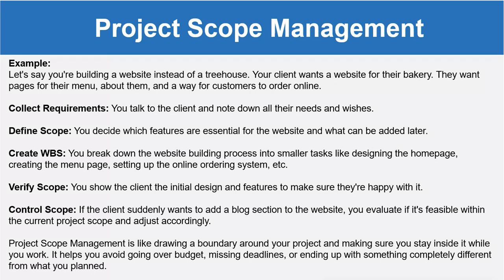Then verify the scope means that you show the client the initial design features to make sure they are happy with it and they are agreeing with the scope. Then control scope means that if the client suddenly wants to add a blog section to the website, you evaluate its feasibility within the current project scope and decide whether you can add it or not.